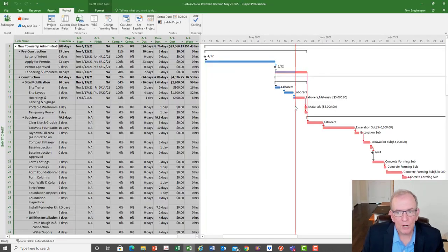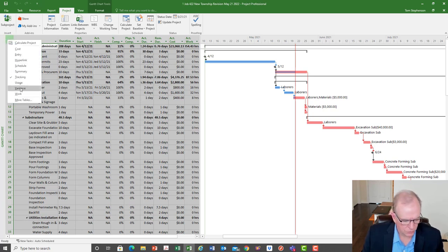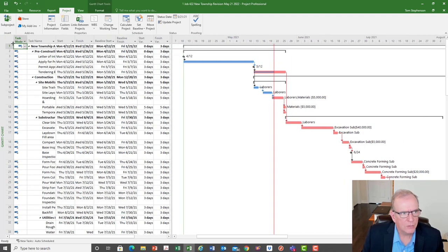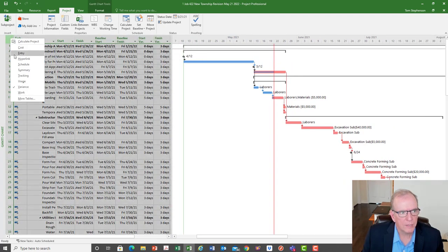And now I'm going to try and fix it. So we're delayed here, I'm pretty sure. I don't know how much because I should go to the variant screen. That's the screen that I see all this stuff in. That's where I see my delays. So there you go. In the variant screen, I clicked the square icon box. I went to the variant screen. I can see I'm 3 days behind schedule.